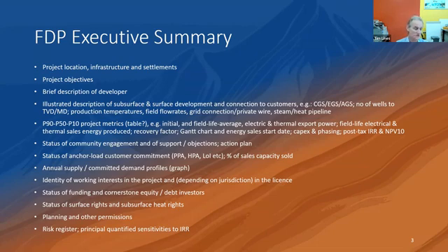Where we are in the northeast, the church owns an awful lot of the land, and engaging with the church is no mean feat. It's several hours, several years of discussions and negotiations. The other things that you'll be familiar with, plannings and other permissions, all onshore projects have those requirements. And perhaps one of the longer documents is the risk register. And that register needs to look at everything from the subsurface right through to indeed the customers. So every single part of that, you need to identify the risks, look at how likely they are to compromise the outcomes of the project, and where those are significant risks, you need to have evaluated what are the mitigations for that risk.